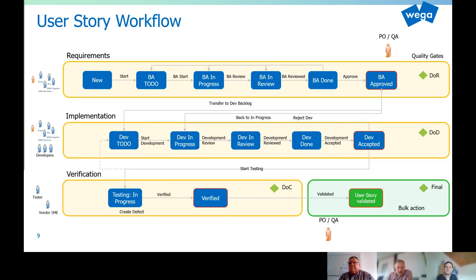So here in more detail, you can see how we've set up our tool set as an implementation of this high level workflow that I just explained. Each backlog item or requirement will enter the product backlog in status new. In this initial status, requirements are still in very different raw formats, as they may enter backlog from very diverse sources. Next step is that the product owner orders this list and decides together with the BA team which requirements are most important to work on.